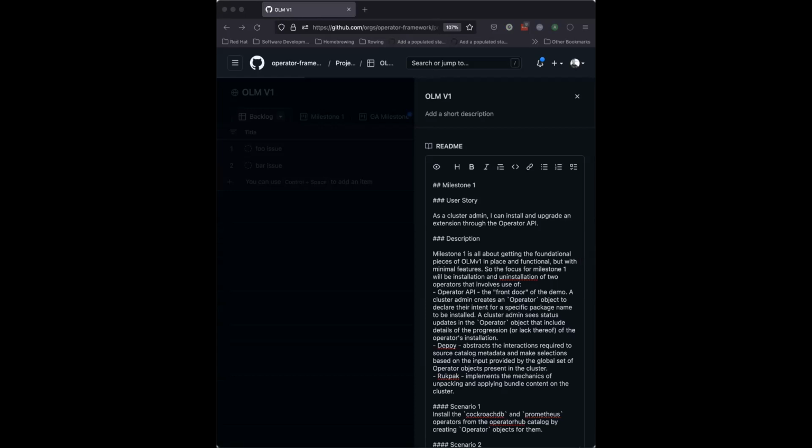This gets at one of the points in the agenda about how far in advance we should plan. In my mind, probably not that far in terms of actual issues that we should work on, because the further we try to plan, the less we know about what exactly we need to do, which makes things less actionable.